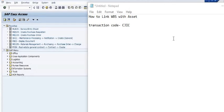In SAP PS, once we create a project, we have to create the project definition. In that project definition, we need to create WBS site-wise or depending on the requirement. Once the WBS has been created and successfully budgeted and material and services are applied in the network activities, then the next step is to capitalize the WBS. This means the amount lying in the PS clearing GL is transferred to the respective assets.